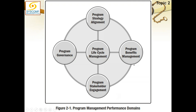Benefit management: as soon as the first component finishes, benefits start yielding from that specific project, and benefit management work starts right there. Benefits continue until the last component is started. You are continuously doing program benefit management, and when the last benefit has started, you consolidate benefits and prepare for transition. Once that is done, a sustainment plan is provided to the client so they can continue reaping benefits.